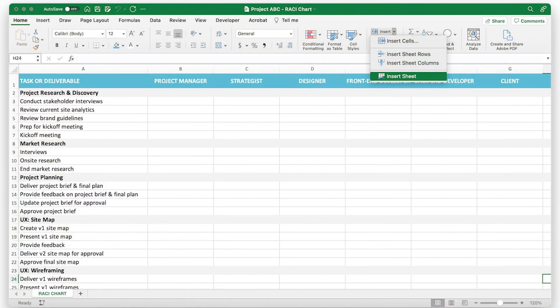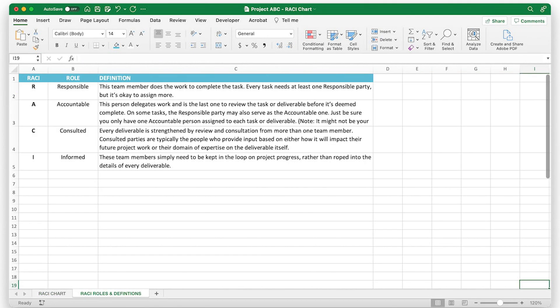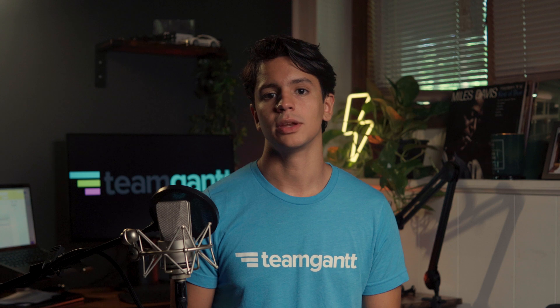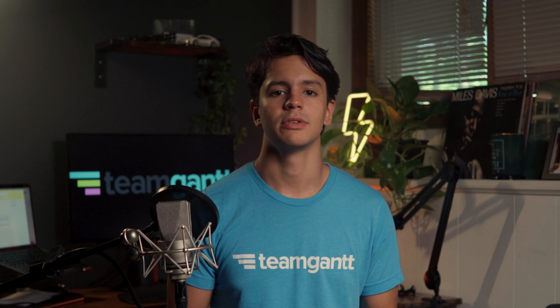Click Insert, Insert Sheet from the Home ribbon at the top of your Excel workbook. Go to your new worksheet and list each letter of the RACI acronym in column A. Then enter the corresponding roles for each letter in column B and their definitions in column C like we've done in this example here. This worksheet provides a handy reference in case you or your teammates need a refresher on RACI roles and definitions. We'll also use this to populate a drop-down list in your main worksheet to make it easier to assign RACI roles quickly.